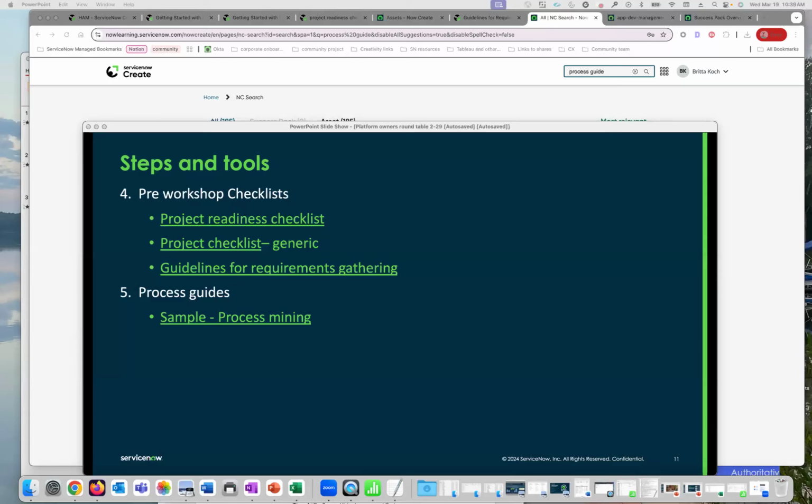And then once you understand how it works and what you actually need to change, let's look at what needs to change, because I've seen projects spin and spin and spin on the smallest details because they're trying to make it similar to what their legacy system was, or they're trying to make it fit everybody. And people are going to change their process after they start using the tool, no matter how they design it. That is the fact. It's just going to happen.